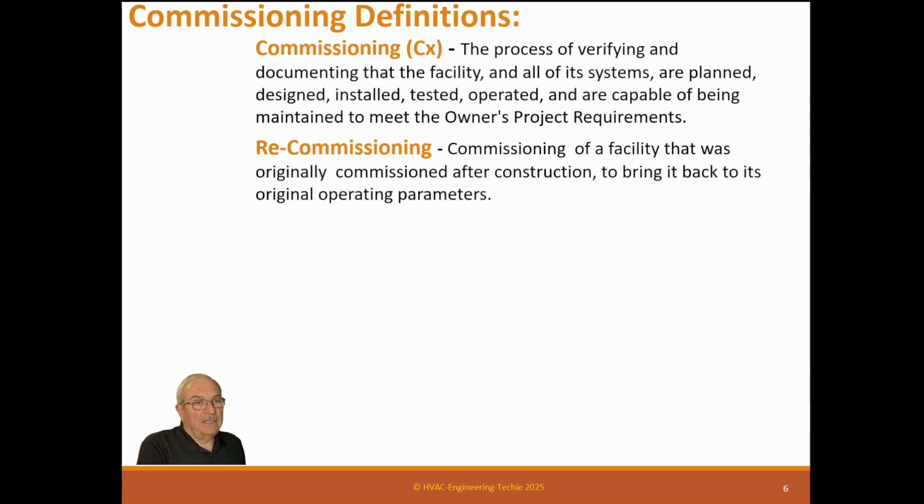Recommissioning: commissioning of a facility that was originally commissioned after construction, to bring it back into its original operating parameters. So over time, everything degrades. And recommissioning is basically coming back in and going through everything, testing and setting it all back up so it's like it was when it was new. Well, the problem why that's not retrocommissioning is we're trying to take an existing building and we have no idea what they've done in that building until we get in.